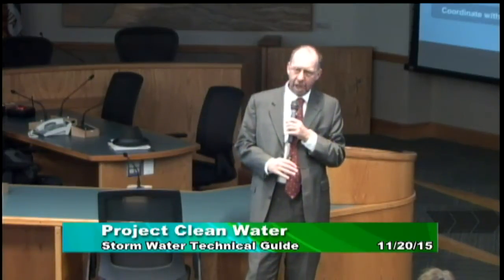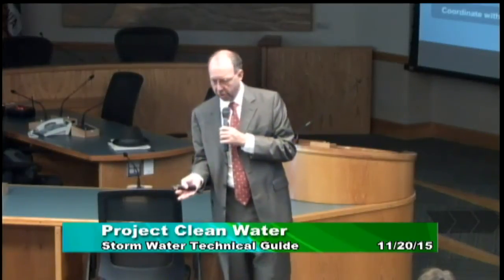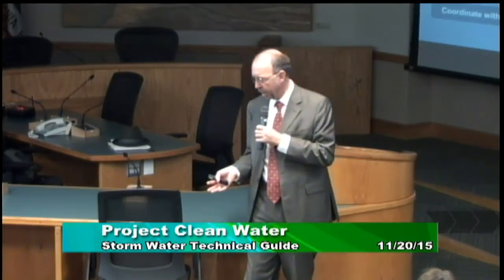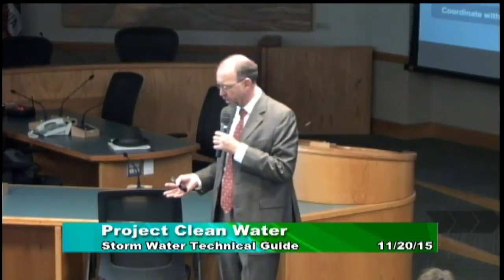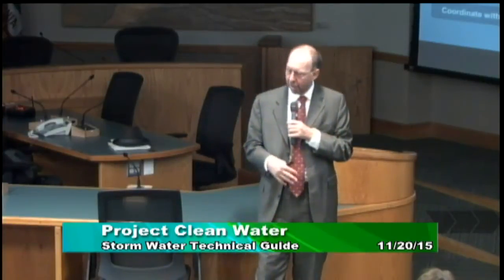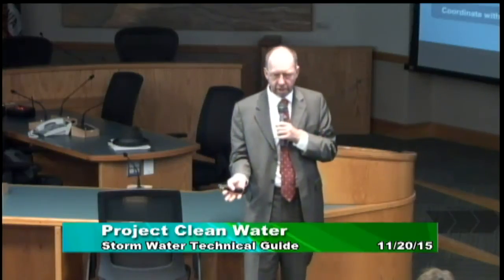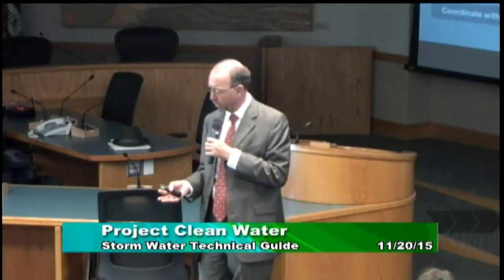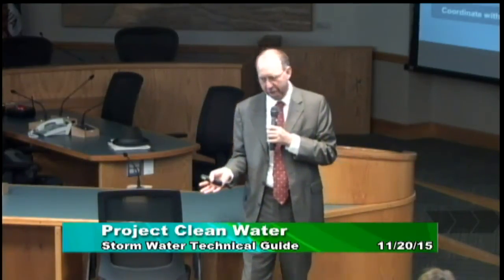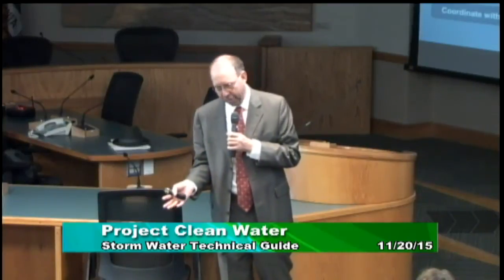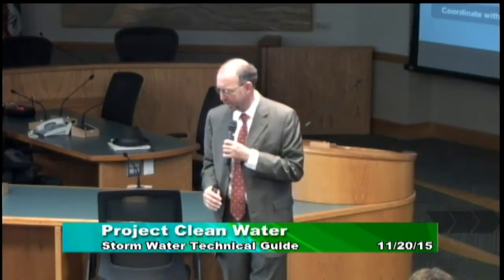And so I think what really does work is to have a really functional process where you have a pre-application meeting, you have an understanding with staff ahead of time about how this project is going to go and how it's going to be integrated. And by the time they go to the planning commission, they pretty much know, yes, we have an integrated design and this is something that they're likely to approve. If you have a situation where staff goes to the planning commission and they often don't know what they're going to do, then I really sympathize with you. I would not want to be in that situation as a developer.